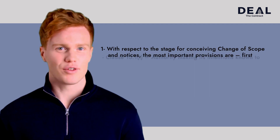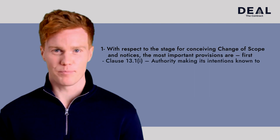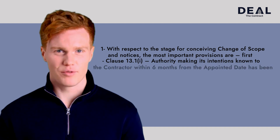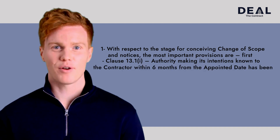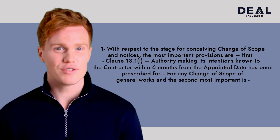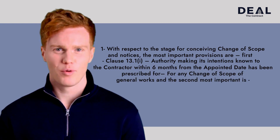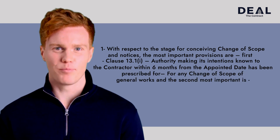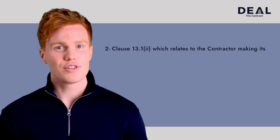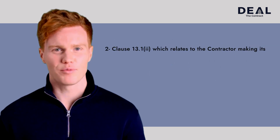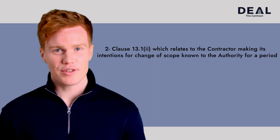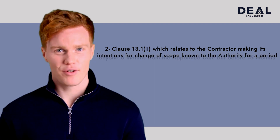The most important provisions are: first, Clause 13.1.1 — the authority making its intentions known for any change of scope of general works; and second, Clause 13.1.2 — which relates to the contractor making its intentions for change of scope known to the authority.